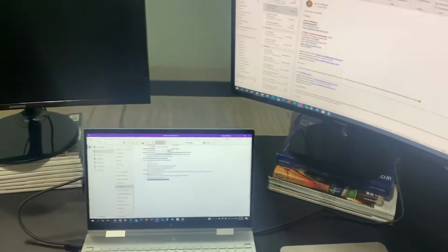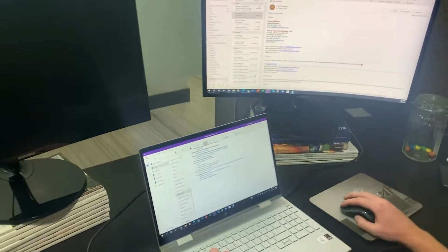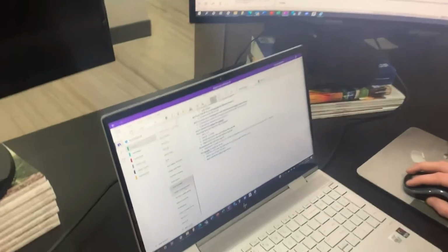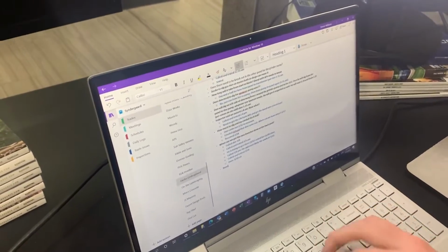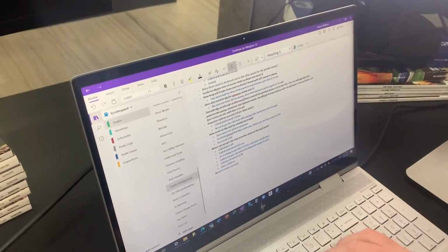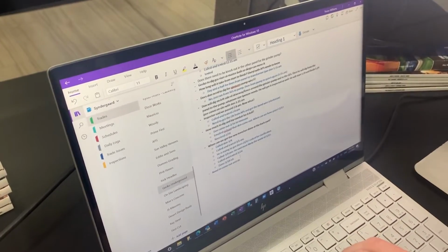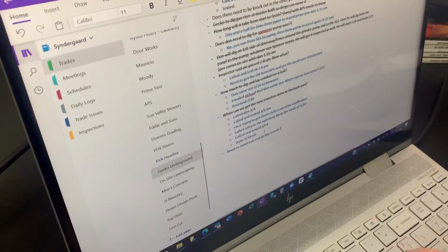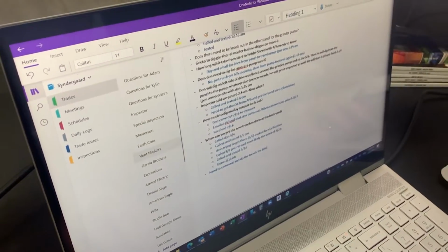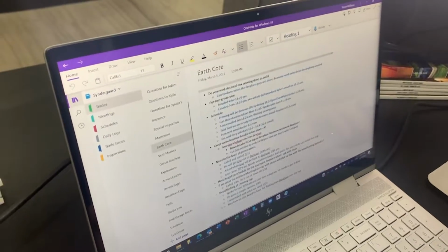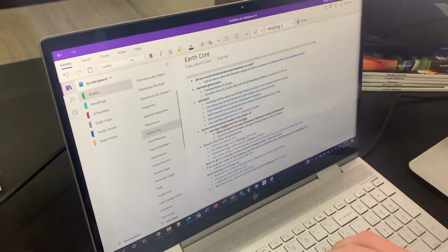And then each company has their own notebook, and then again you can open that up into another section there, another tab, and now they go through and they document all the communication. When they have phone calls, calling our excavator, on red lines of the plans, on footing depths, something the surveyor caught. And so every time that they make a phone call, they document the time of day when that phone call was made and what was discussed. And so they have this living, breathing document, which is really important.